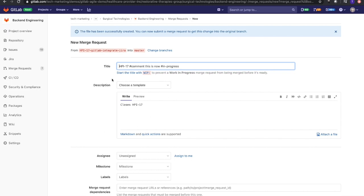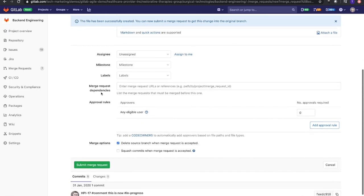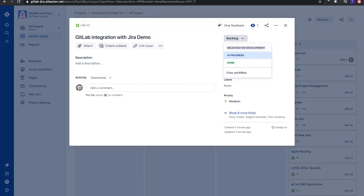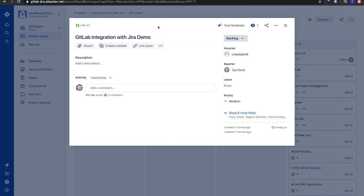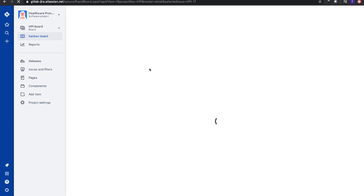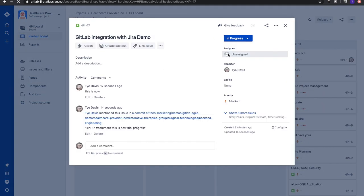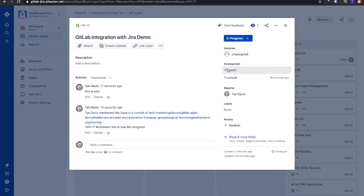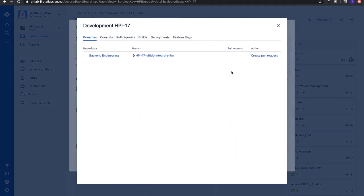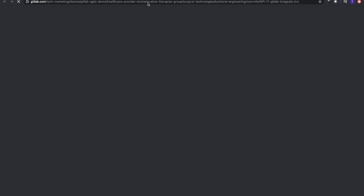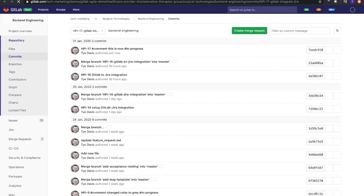If I commit these changes - it corrected that up there, so let's do this - commit these changes. Now it opens up the merge request. The merge request is not yet submitted, but what we can take a look at is if I go over here and refresh this issue, we should now see that it's moved to In Progress. I see there's a branch and a commit connected to this issue.